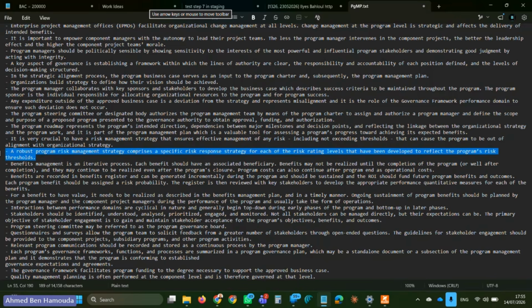And why did you not manage them properly or identify them early? Because we did not have a risk management process in place. For example, now I go back to the original reason. The absence of a proper risk management process has allowed the threats to become issues, and those issues blocked, impacted, or affected the realization of value.